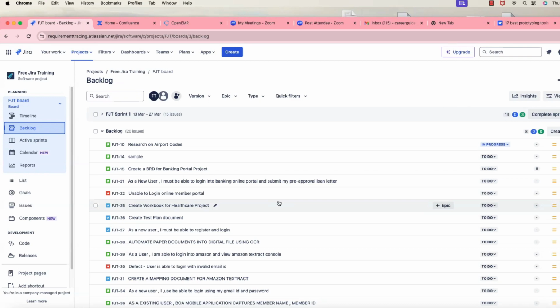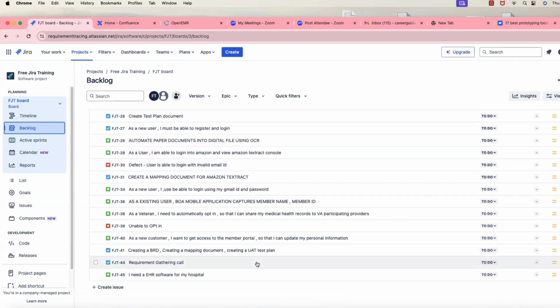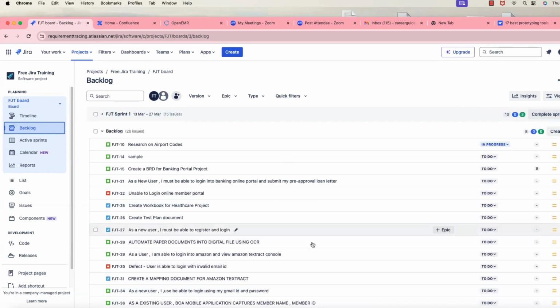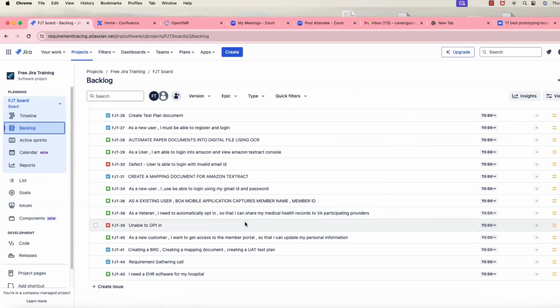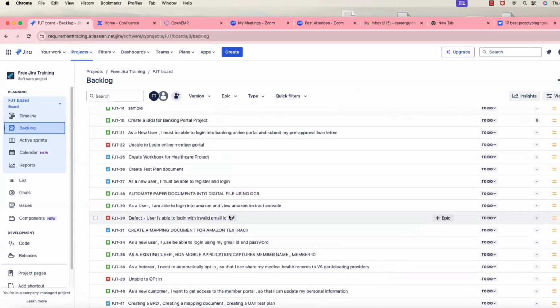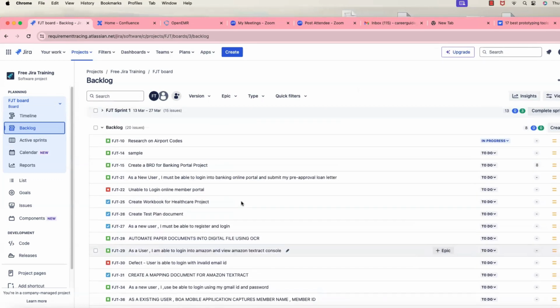Okay. So they will be like, among all these, we have to prioritize. Tell me which one has to be essential. Then I'll say, we have only 3 developers and 2 of them are going on PTO. So each can do only 15 points, so maximum we can do maybe only 45 points. Now what I can do is pick up the stories which are very, very highly essential. Every user story can be an 8 pointer, a 5 pointer, like that.